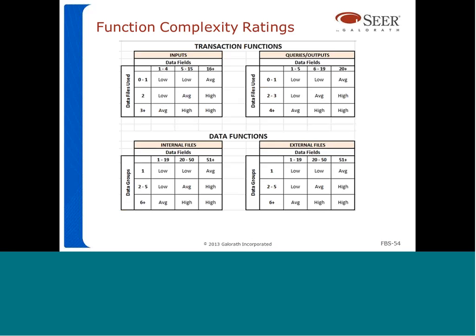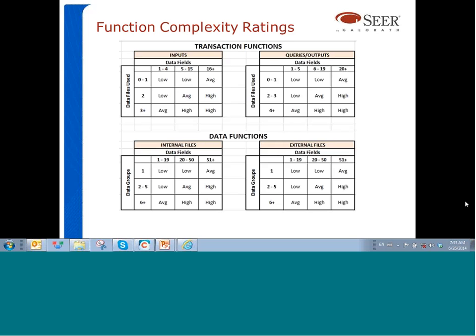All right, so now that we know the three concepts that are used to rate transactions and data functions, we're going to use these tables here to rate the complexity of the transactions. And these tables are going to be used to rate the complexity of the data functions. So here are the concepts that we previously described. So for inputs, we're going to use the number of data fields and data files used.